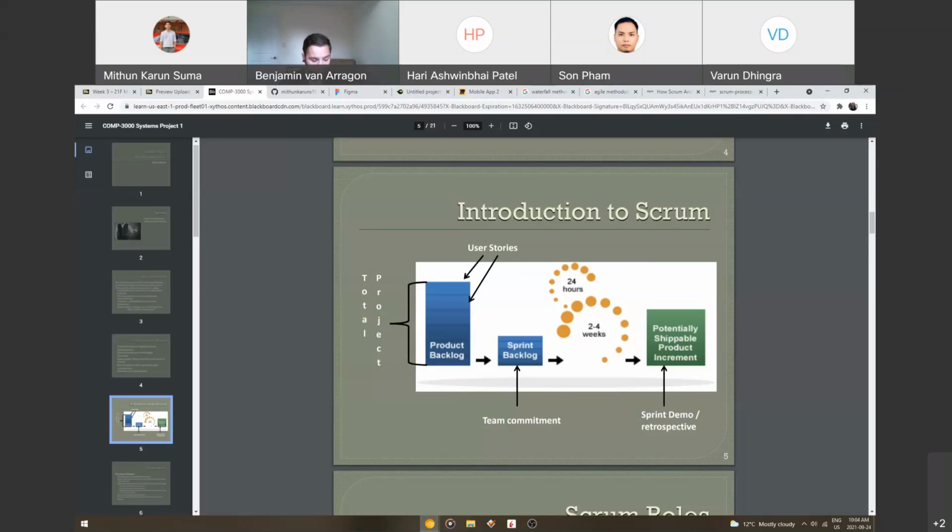And then at the end of the year, you show them the product and then they decide that they don't actually like it, right? So in this model of working, you're involving the customer in a decision process every 2 weeks, so that you can catch mistakes that they won't like early on, as opposed to letting it get away and build into a potentially way bigger problem.